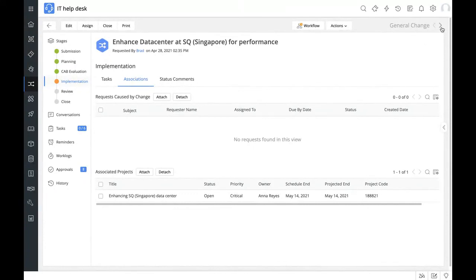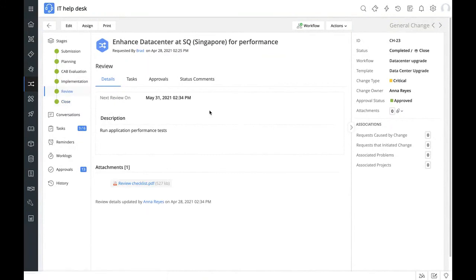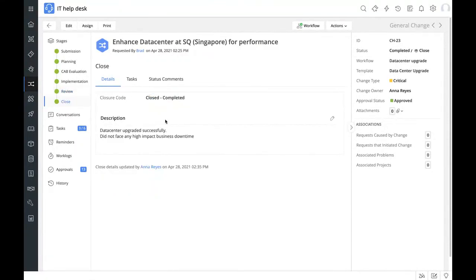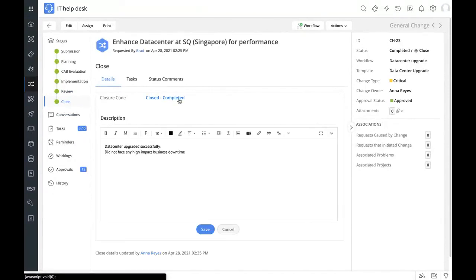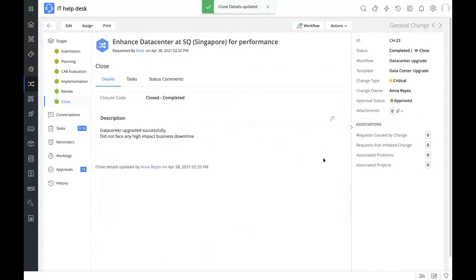Once the change goes through implementation and gets to review and close, a completed workflow would head to the review stage where you set the next review date to verify if data center performance has improved. You can also have a review checklist for application performance tests. Finally, it takes up a closure code — since the change is successfully completed, it takes the 'completed' closure code. Let's take a look at a completed workflow now.